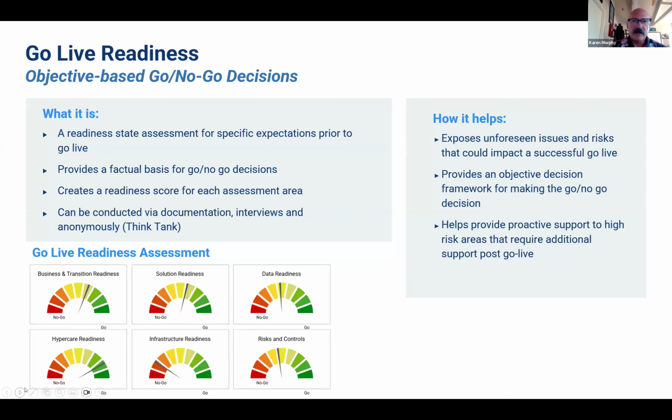And I was doing a lot of go live readiness assessments, and I discovered that functional changes were coming, but they really weren't understood by the business very well. So, I did this through some interviews and some fact finding, looking at the organizational change management track. And I discovered that there were relatively few change impacts. For those that are org change savvy, there were relatively few change impacts identified in the change impacts deliverable. And so that kind of raised my curiosity.